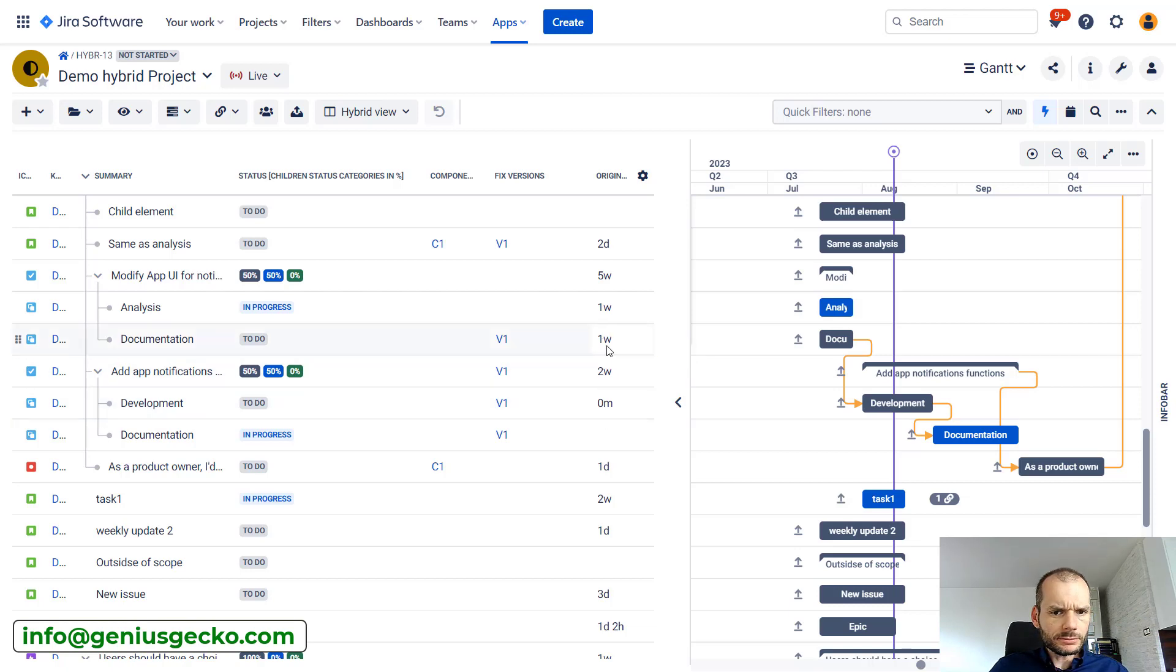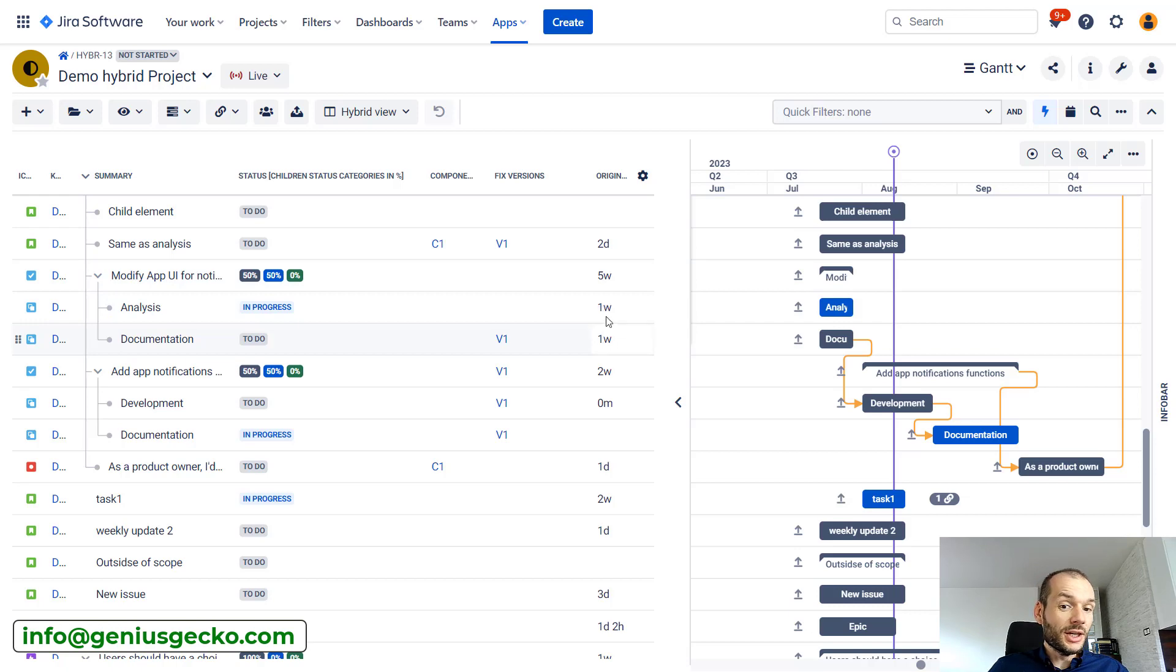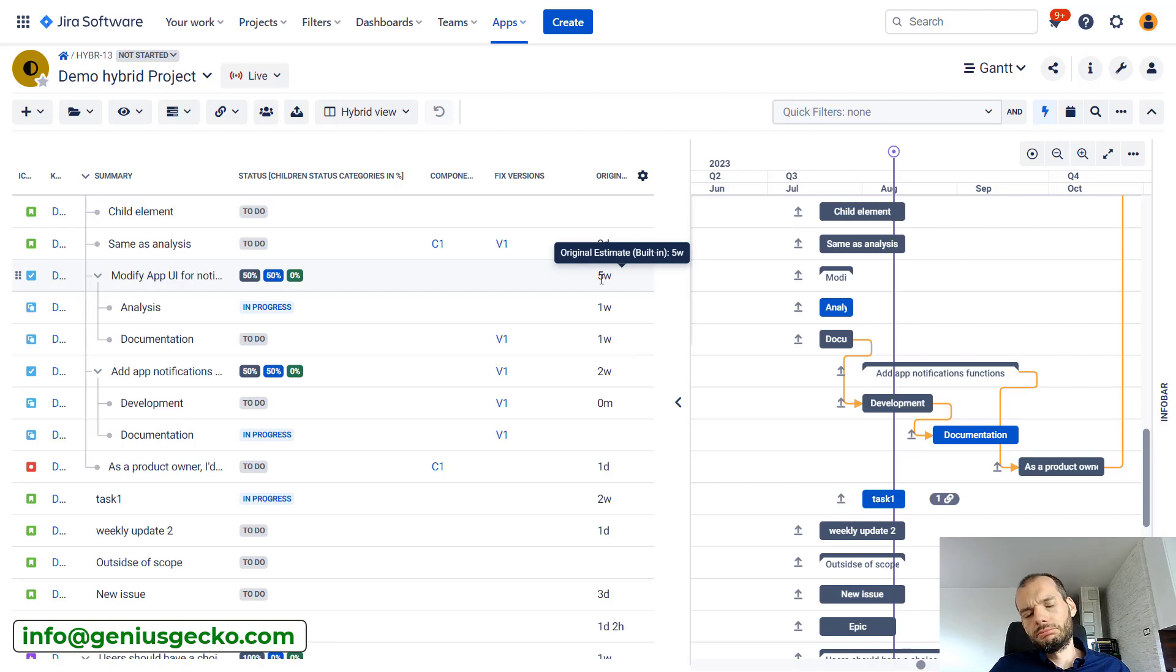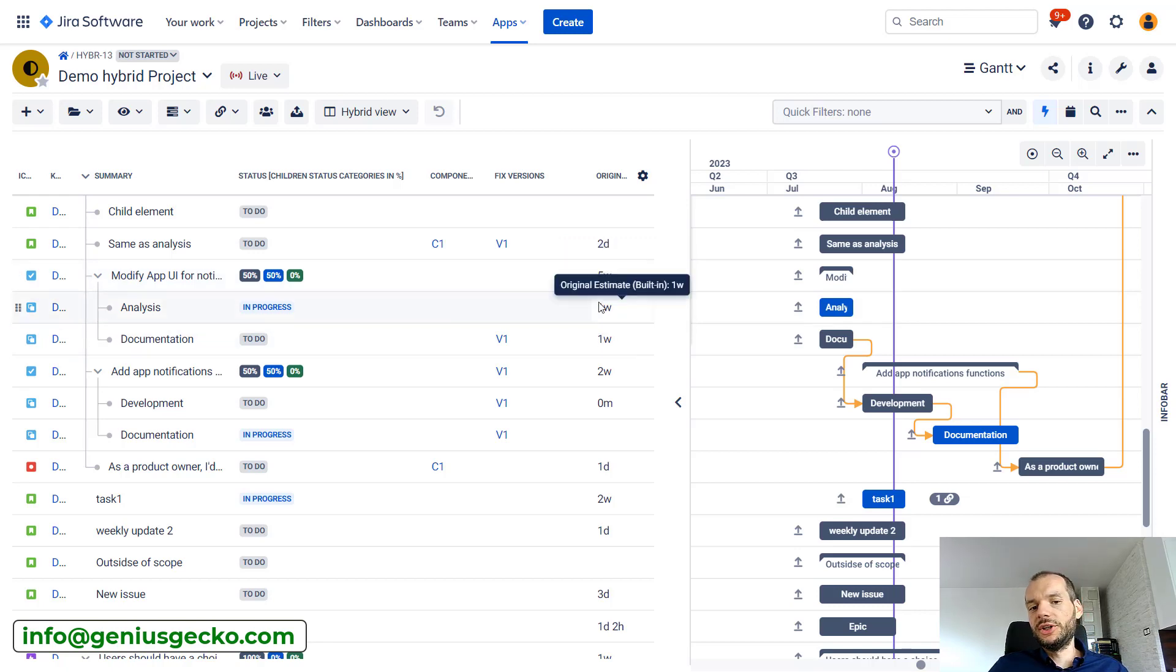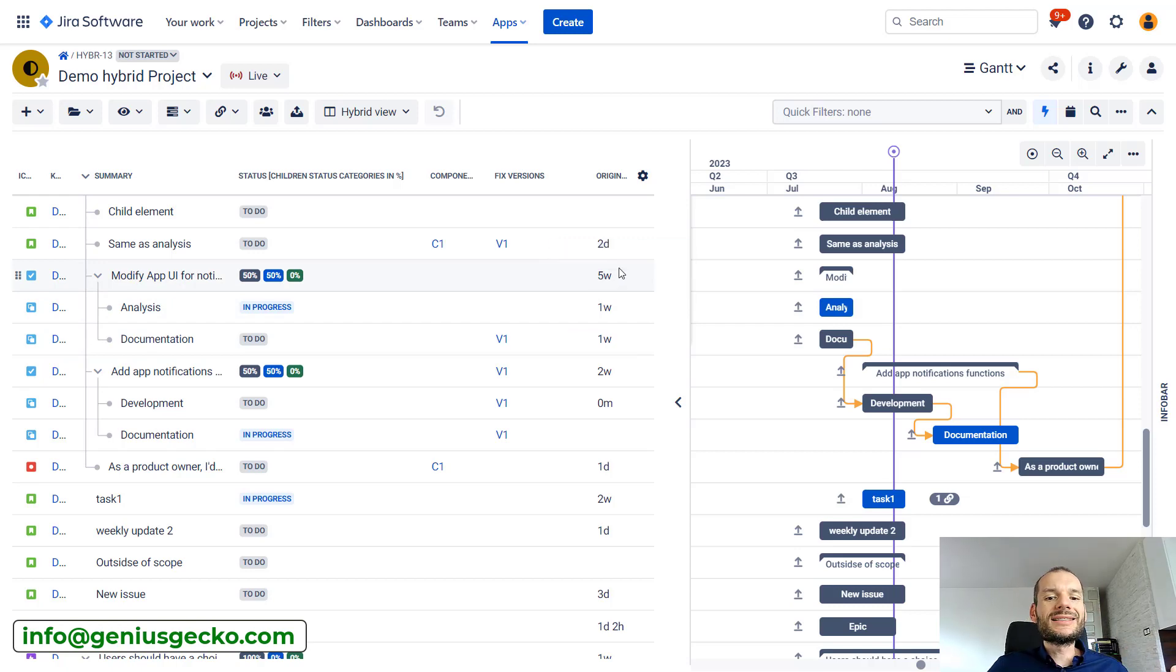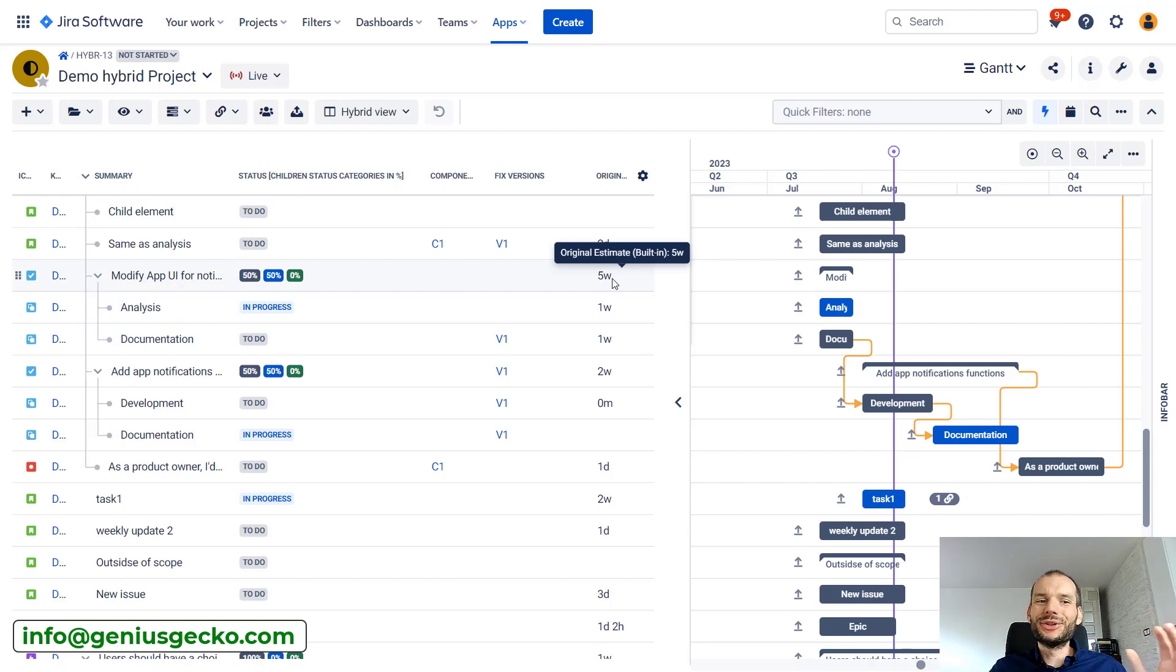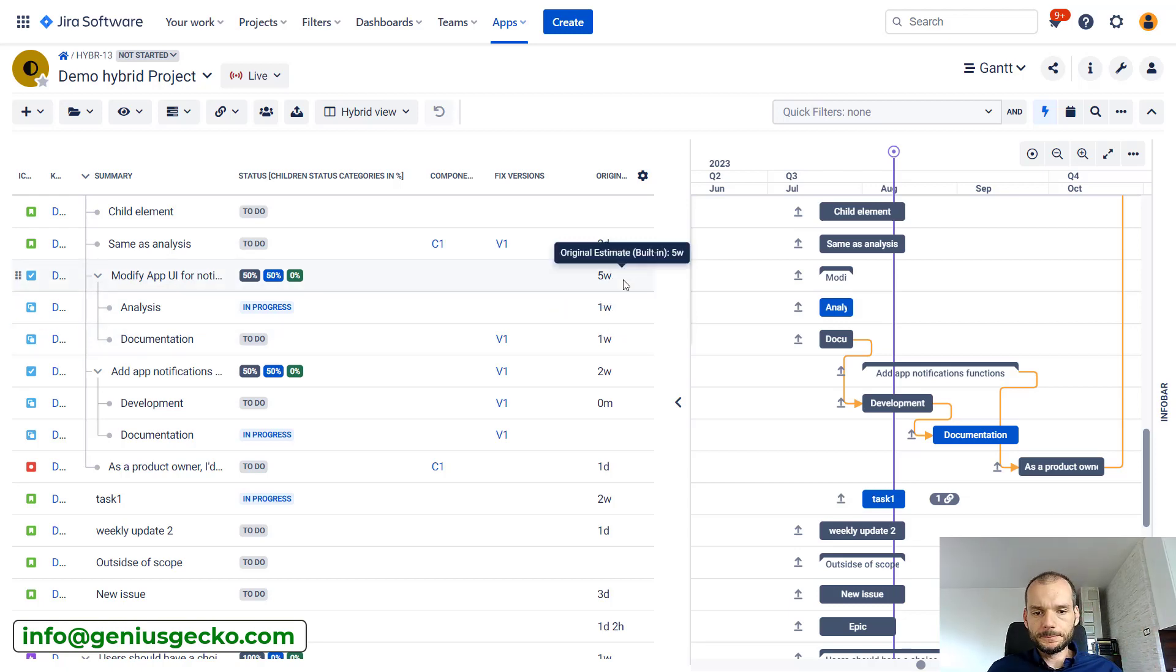This one is a good example - children have one week each of estimates. On the parent level, total is five weeks, so probably there is one week for one child, one week for the other, and three weeks for the parent. So in total, the estimate for this part of the work breakdown structure is five weeks.